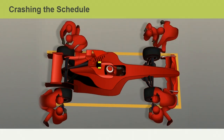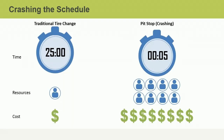Now, let's get back to that pit stop. Isn't it more likely that there would be eight highly skilled crew members, two per tire, working to quickly get that race car back on the track in order to win the race? This is an example of schedule crashing, a schedule compression technique. When you need to compress or reduce the duration of an activity, you may designate more resources to it. When we designate additional resources to an activity in order to compress the schedule, it comes at a cost.